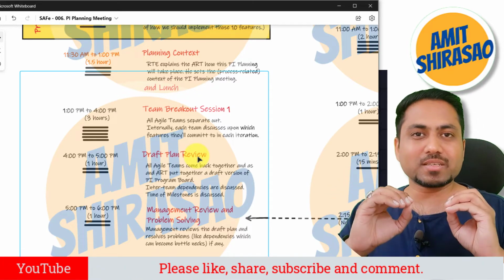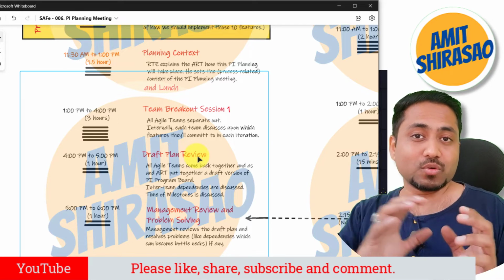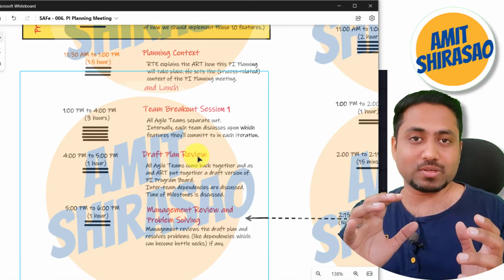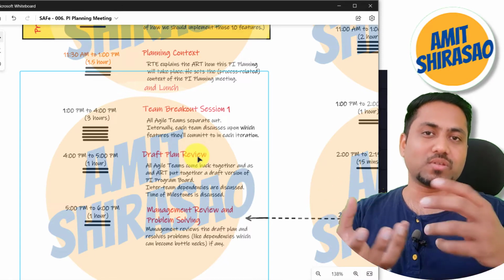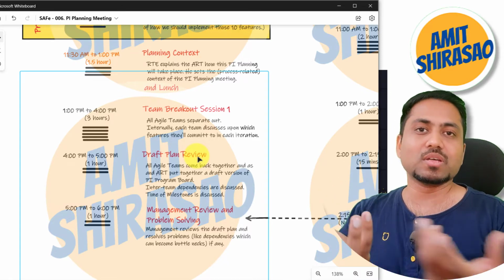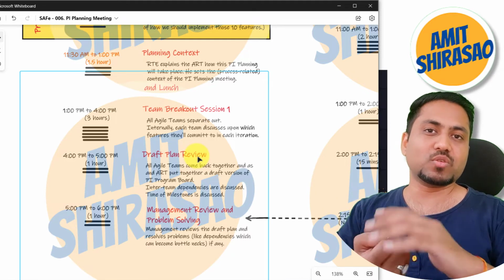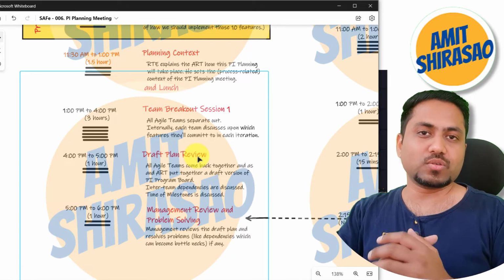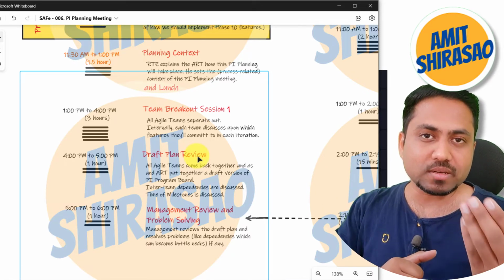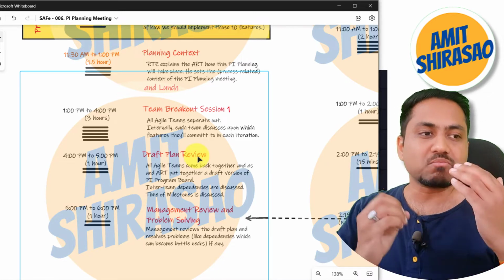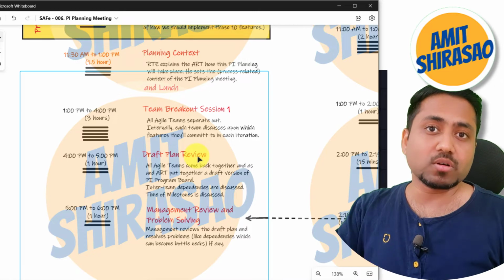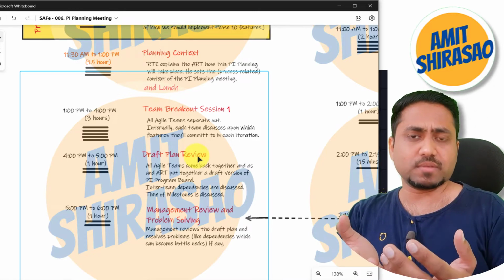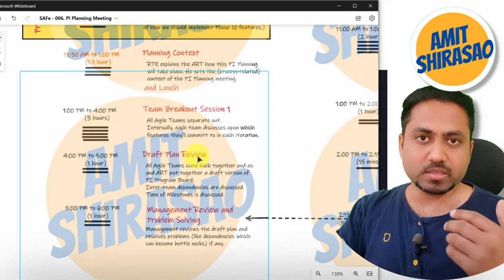Of course, if you ask by the book, is it good to loan out resources? No, it is not good, because then your team is not consistent. All your team metrics will look fluctuating all the time, so you cannot guess how the team is doing over time. Of course, you should not loan out resources, but loaning out resources is a reality. You do it, probably many people do it all the time. Should it be done as per the book? No, it should not be done. Team should be consistent. But is it not done?